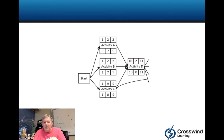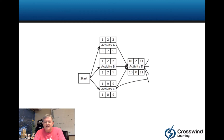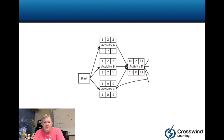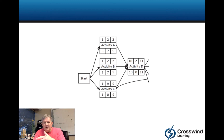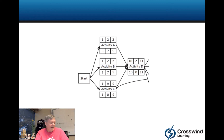For D to be tied to A, B, and C, all three have to be done before D can start. So the earliest D can start is the start of day 10, because activity C is one of the predecessors and it takes until the end of day nine. That's an example of how you could have early finishes for A, B, and C, but your early start for D is going to be based on the latest of those predecessor finishes. There's also logic for going backwards to get your late finish and late start dates, but I'm just setting the foundation for where these numbers come from.